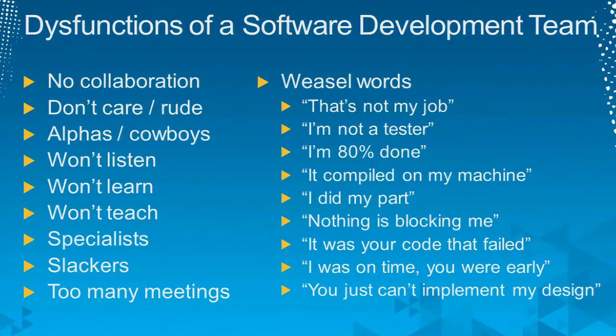That's why you've got a scrum master or somebody on the team doing the scrum master's duties, so they can capture these impediments, make a note of it, and then maybe after the meeting say, how important is this? Who do I talk to? Okay, you go back to doing your work. I'm going to become your concierge here, your servant leader, and get this impediment removed for you. So if you start to hear these weasel words, you can start to think there might be some dysfunctions that exist.